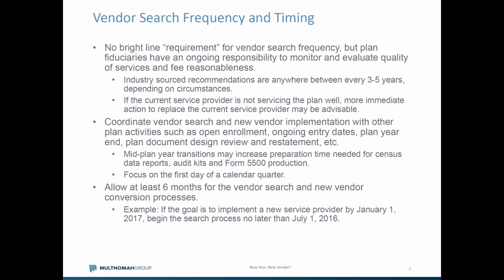One of the important things as you contemplate conducting a vendor search is coordinating that search process, and what potentially could be an implementation timeline, with the other activities going on within the plan and within your organization. Things like open enrollment, entry dates, plan year end, any work you're doing on plan document design and review. Frequently we work with clients where the day-to-day administration of the plan is owned by a benefits group or HR group, and trying to tackle a project as large as a vendor search when you're going through open enrollment, or evaluating healthcare options, or trying to implement a new HR software system, can be pretty challenging.